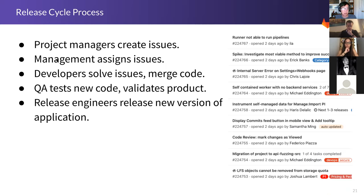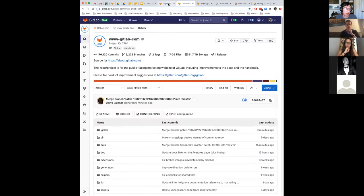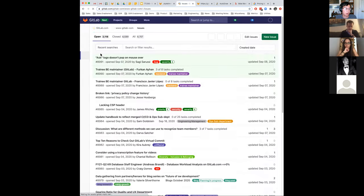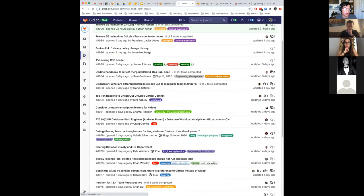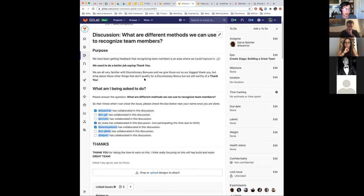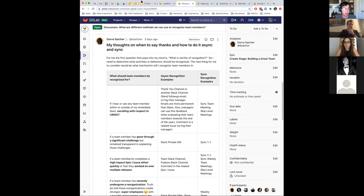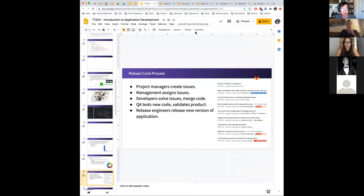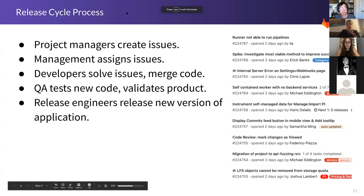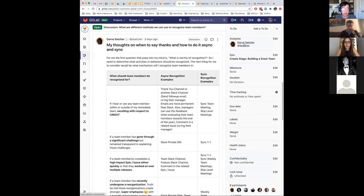In GitLab, project managers create the work and then create 'issues' — individual units of work. If you go to the GitLab issue board, there are all these things people are asking for: update this chart, create some new thing, and people collaborate on the best way to do it. Engineers get assigned issues — you can see this person called Darva is responsible for implementing one issue. This is how they get credit and how they get paid.